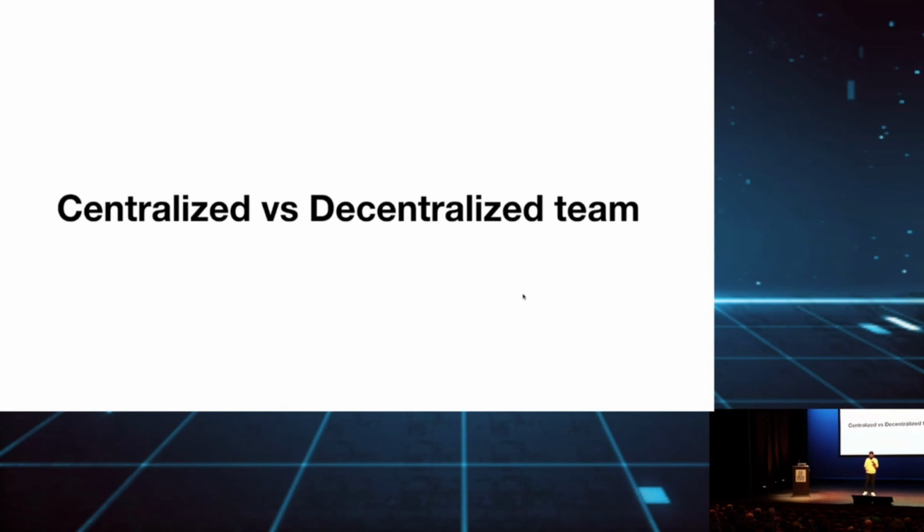So we have the centralized platform team who takes care of doing that migration for us, who addresses and pushes this principle across. Initially, you could start with, hey, you have to do this migration. Then you can go further and say you should do this migration. You must do this migration. If you're not doing migration, you cannot move to production. These kinds of stringent rules you can put. And with the help of a centralized team, you can actually monitor the progress and also make sure that they're migrating.